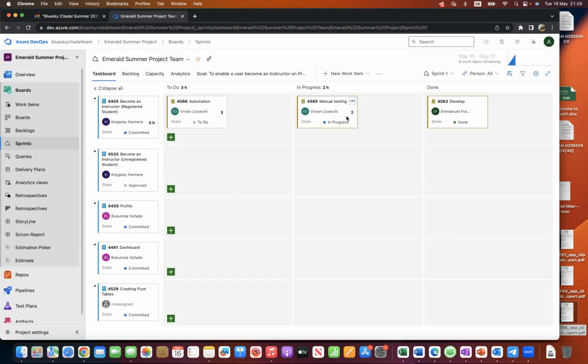You just note that down again as a scrum master to say that, oh, Delphine promised to help Emmanuel to resolve that. You're noting it down so that in case that is not resolved, you can just chase up, oh, Delphine, how far have you been able to help? Or chase up on Emmanuel later on, not in that same meeting. Maybe you give it the whole day, or at the end of the day, oh, Emmanuel, just to check, has Delphine been able to help you to resolve that issue? Oh, yes, it's resolved. You tick that off your log, and that's why you have your impediments logbook document.